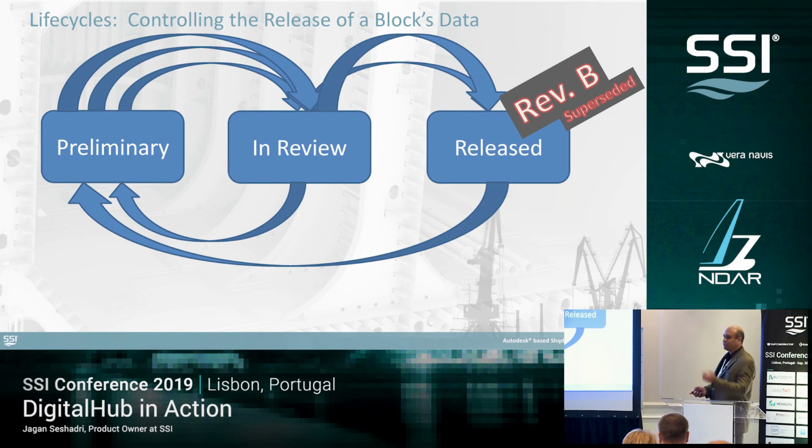So again, that change gets worked on. That gets put in review. And finally, that engineering change passes, and we're going to be re-releasing the block. So that block gets released as Rev B. You now issue a whole bunch of new production documents based around the change. And we keep a historical record of the documents that were issued on Rev A, just in case, right?